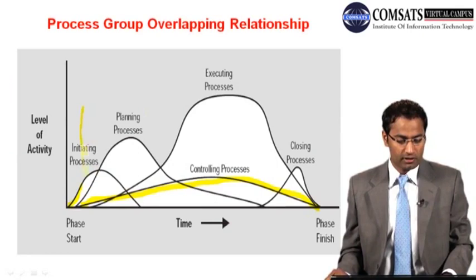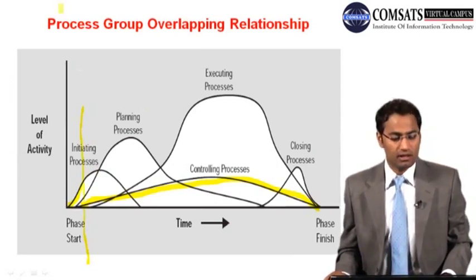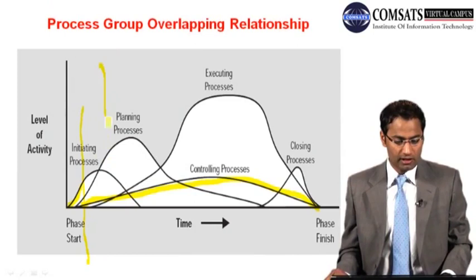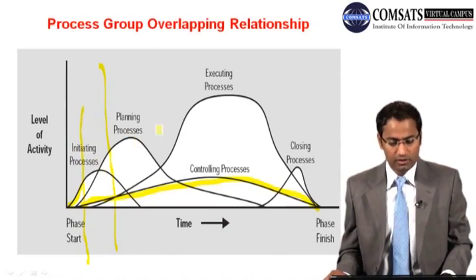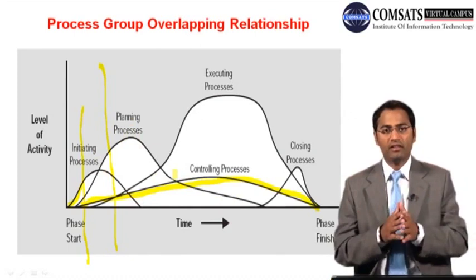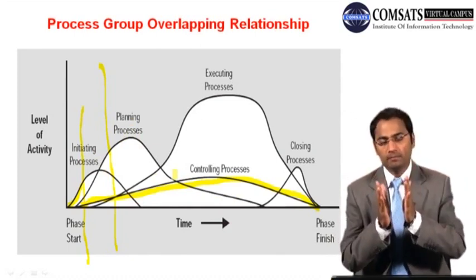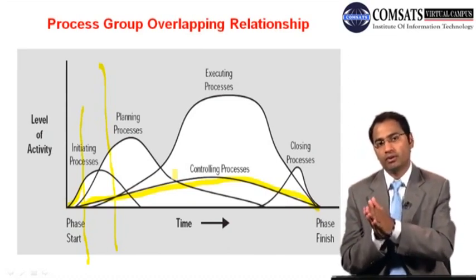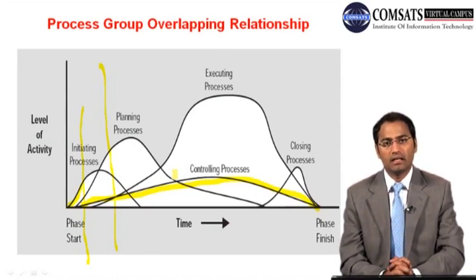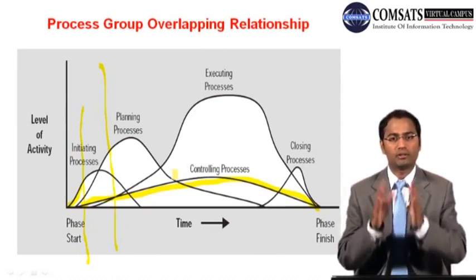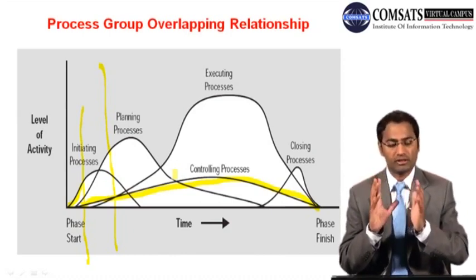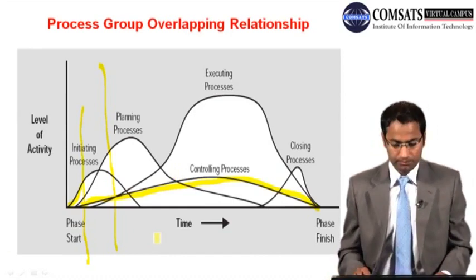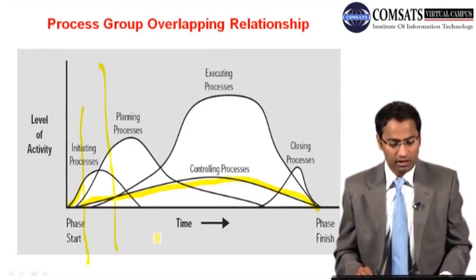There might be a point over there where we have actually developed the project charter, and we have actually got the approval of that. And there may be a point where the project management plan has been approved, but then planning is a continuous process. So if you are having this book, called the project plan, and you are holding it with you and showing it to so many project management professionals, well, you are not doing good. The project management plan, though maybe in a book form, is changing. The process is iterative. Okay, so this is a summary of what we have learned earlier.